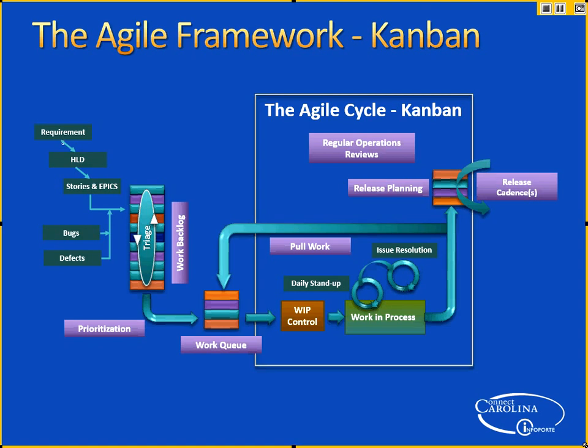Well, that path still exists into the backlog. Now we have others: bugs in stuff that's in development or in test, and in production. I'm sure there are others, but those were the 2 that I added to the chart. They all get in here, and at the right time, they get prioritized and fed into the work queue. Right? And then we make sure that we don't exceed our work in process rule.